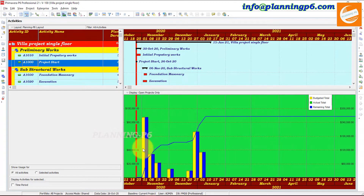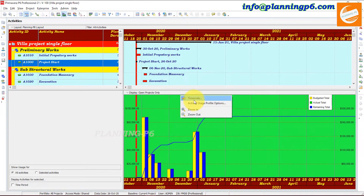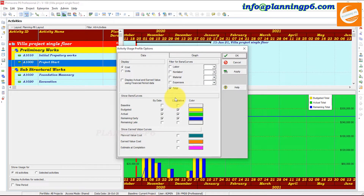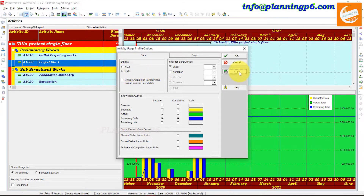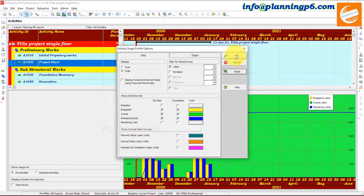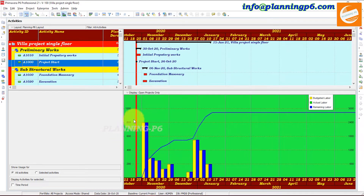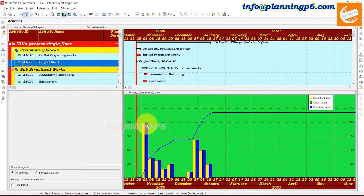Move back. In the Activity Usage Profile option, here is the cost option. Go to Units — if you want to see the cost, select cost; if you want to see the units, select units and apply. Now we have migrated to the hours, so these are the hours for this period which we assigned.